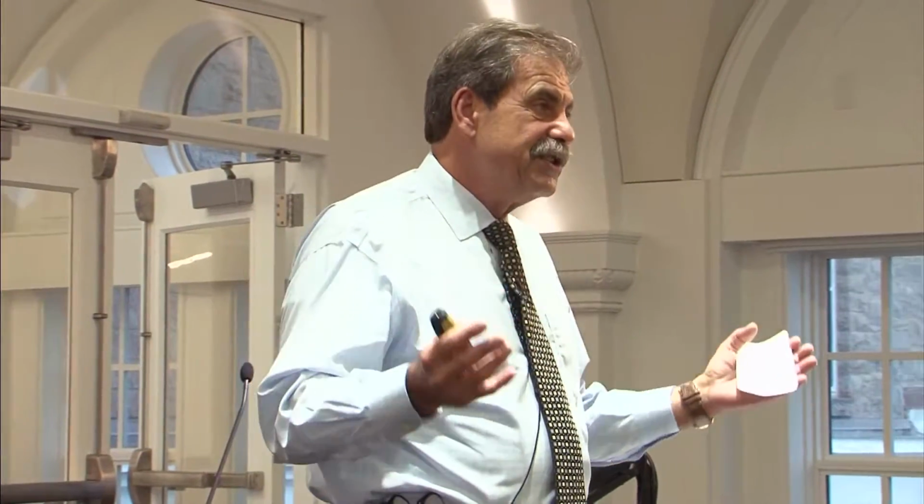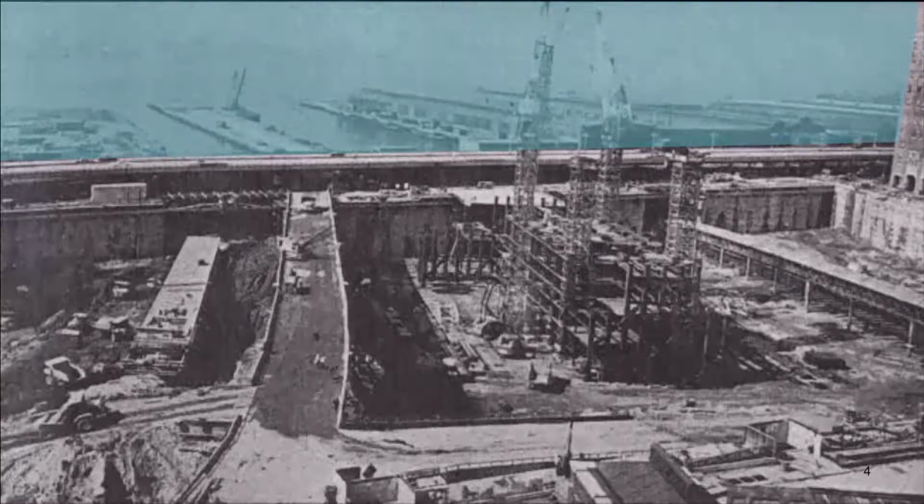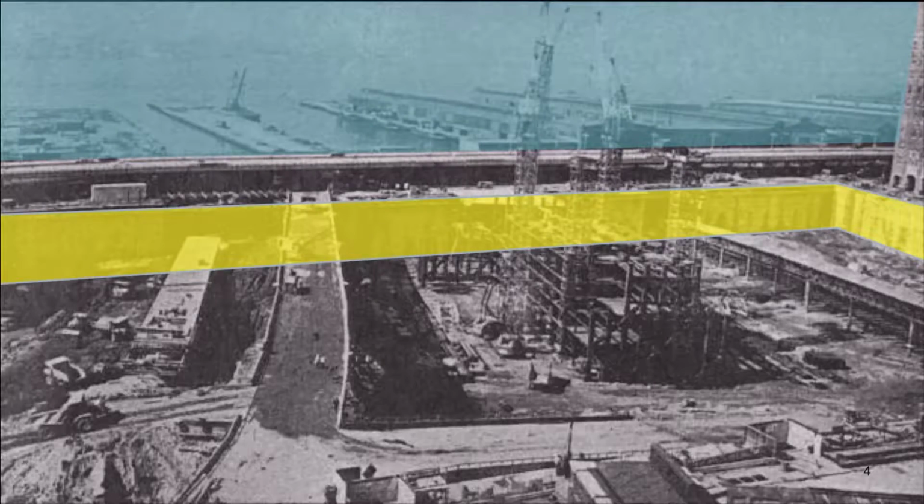So then we come along and David Rockefeller says, okay, this is the great site, this is the part of the deal, so the site had to be made. Now what you have to understand about the original World Trade Center site is, one, that's the Hudson River. It was right adjacent. So the first thing they had to do is they built a bathtub, something to keep the river out of the site.